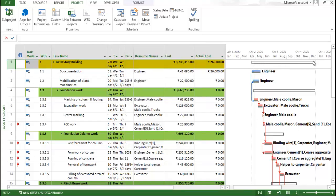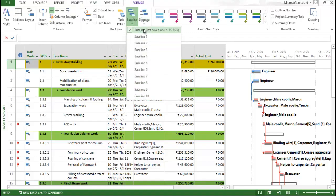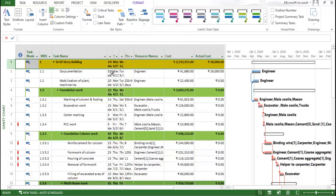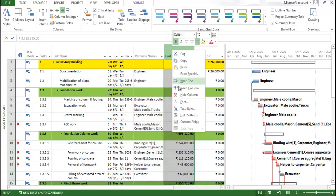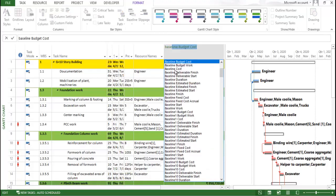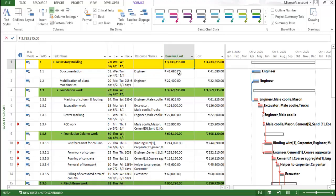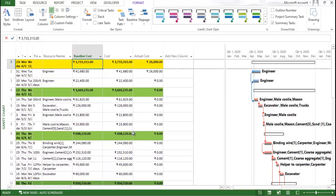When you click OK, you can see a baseline line bar reflecting on the Gantt chart. If it's not showing, go to Format and select the baseline option — if you don't select it, the bar will not reflect. After that, right-click on the Cost column, select 'Insert Column,' and type 'Baseline Cost' to add that column.